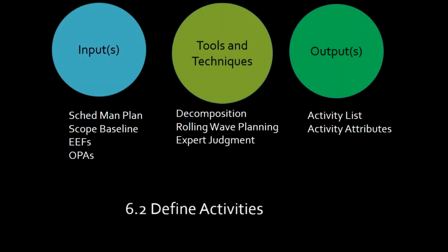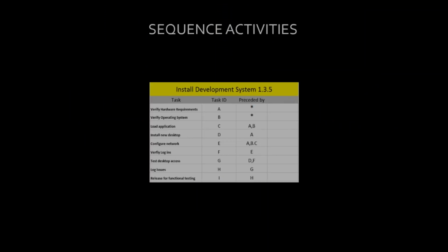These are living documents, and this makes sense, right? We're going to have a list of activities that's going to be comprehensive to every single activity and the attributes for those activities. Okay? Create a little milestone list here at the same time. The milestone list is really going to help us. So far, we don't have a schedule yet, right? We don't really have a schedule yet. So we need something to help define us at the 30,000 foot level from a scheduling standpoint. Milestones do that for us. They're big picture, okay, of the project start to finish across the timeline. And we'll start with a milestone list, okay?